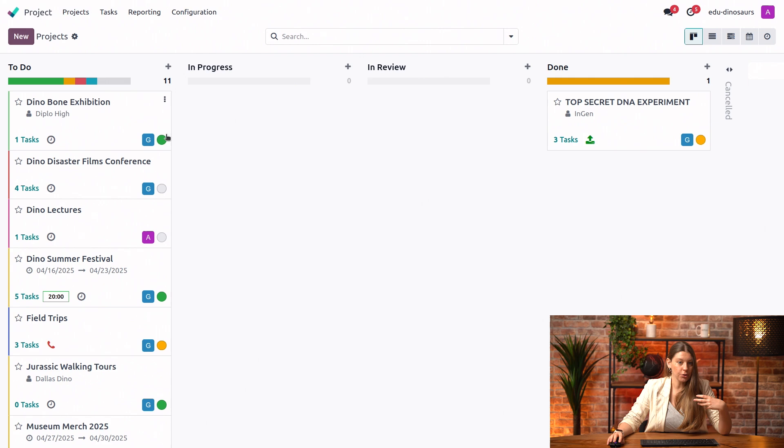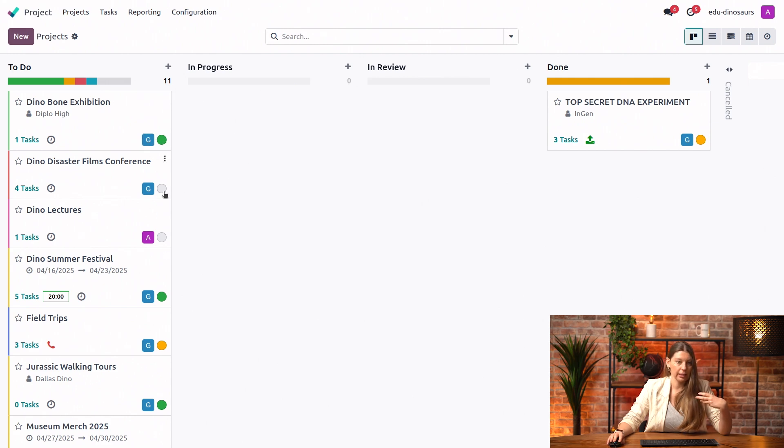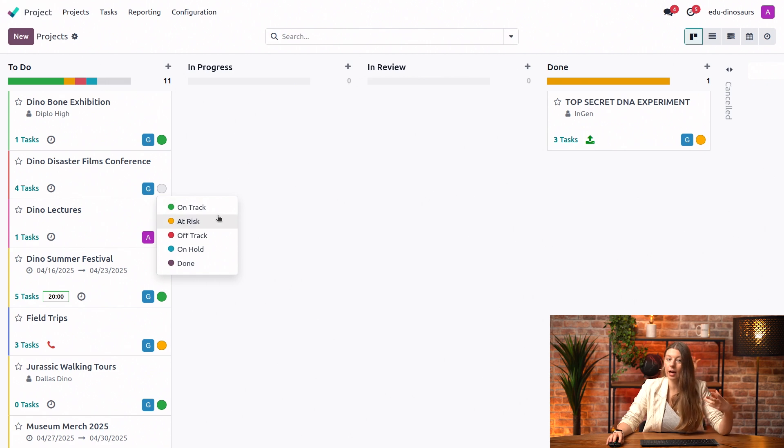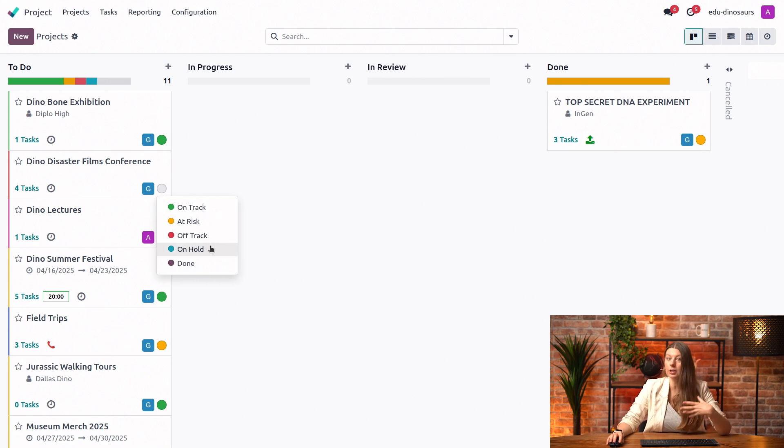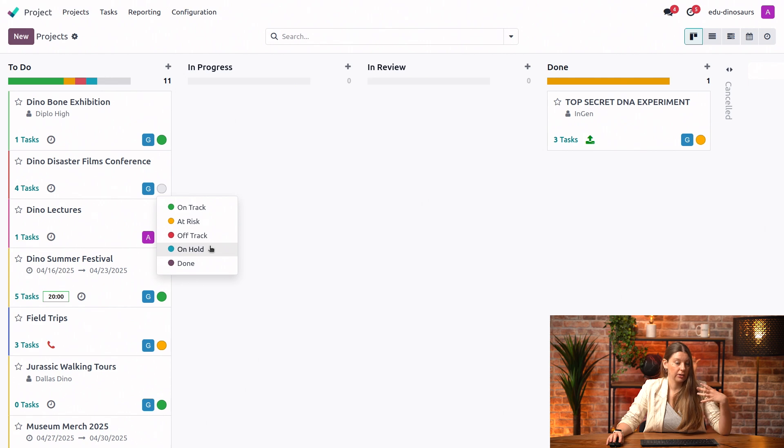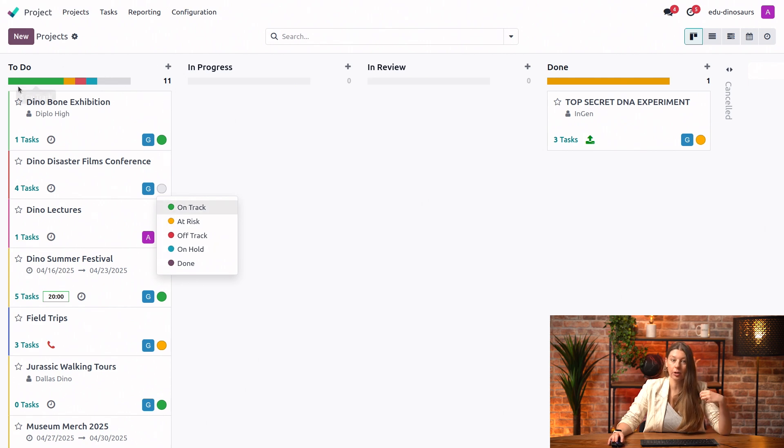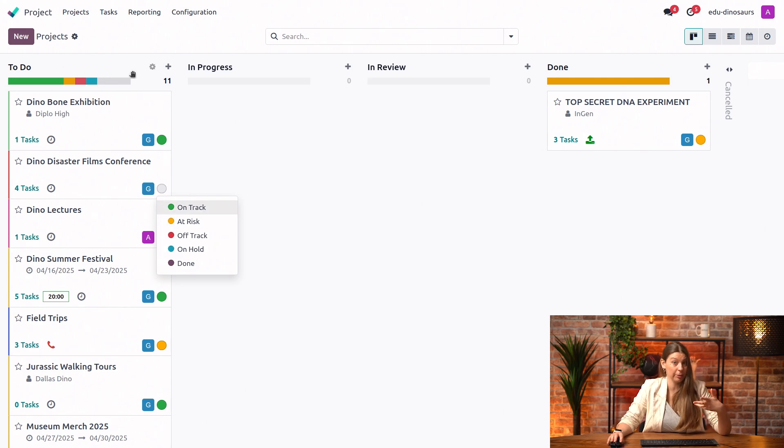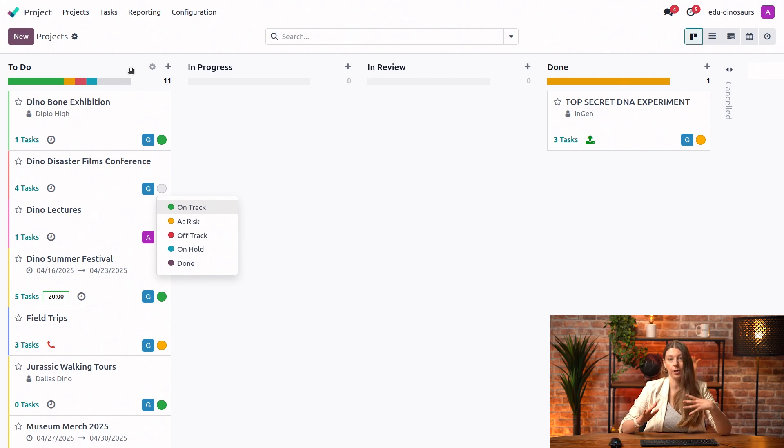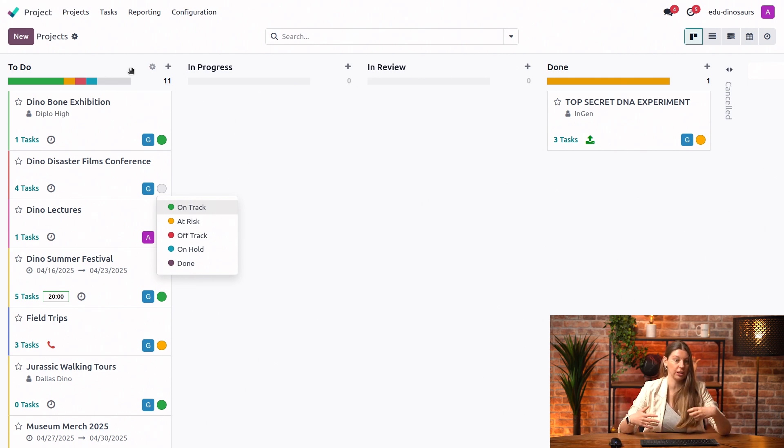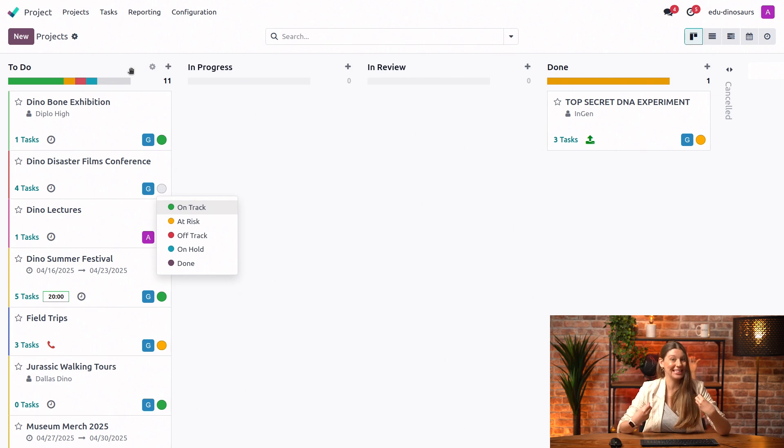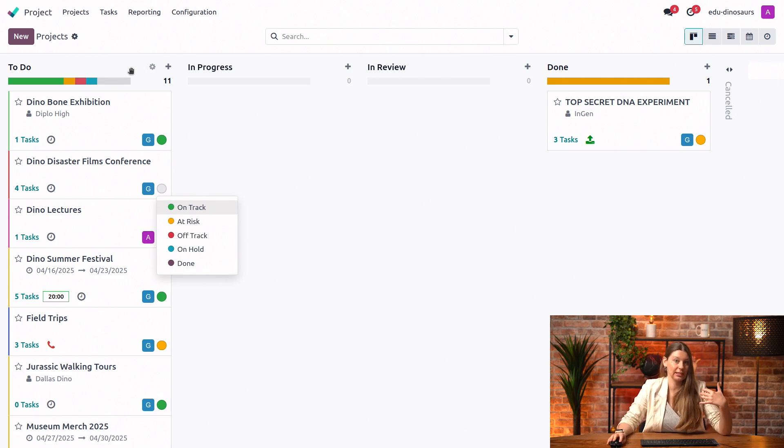And for the statuses, you just by default have this little dot next to your project. And if I click on it, I can say something is on track, at risk, off track, on hold, and so on. Depending on your project status, the project bar, the progress bar here at the top of our column will also be impacted. So you always have a bird's eye overview of each project status and project stage and where the project stands.